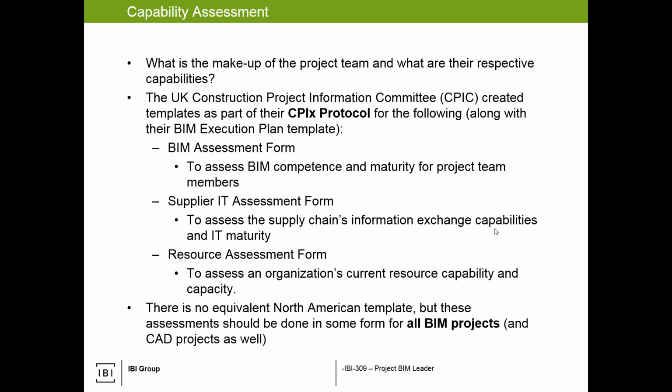And I know it sounds silly, but I've seen many projects where oftentimes we'll take a jump from a BIM perspective and then find out, well, wait a minute, we're delivering from Office X and they've never been trained in Revit or Civil 3D. Or we're good, but our subconsultants are not. Or on the contractor side, yep, we're going to do all BIM, but our subcontractors don't know any BIM, or the supply chain doesn't. So we're asking for a BIM model as part of the shop drawing submission, but they don't know how to do that. They're just going to give us a PDF of a 2D drawing. So what do we do?